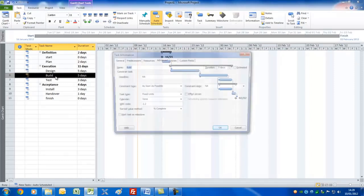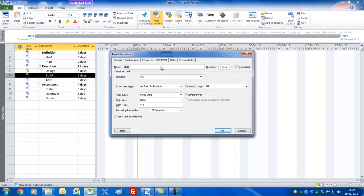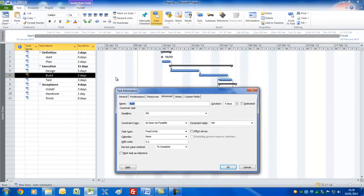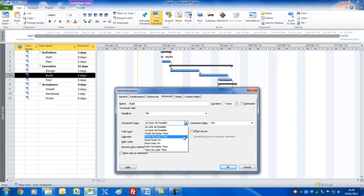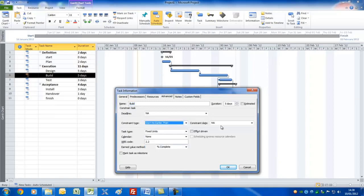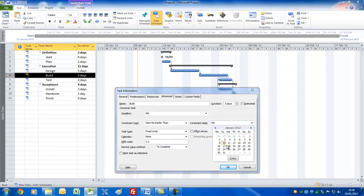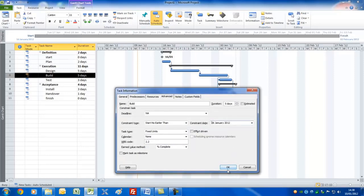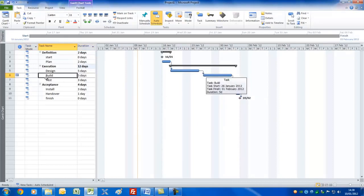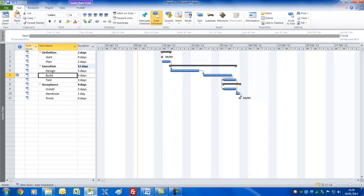Let's say for the Build task you need to wait until some materials are delivered — an external dependency. We'll double-click the task and set a 'Start No Earlier Than' constraint of the 26th of January, just to show that you won't have the materials to start building until then. Press OK. You can now see a one-day delay and a constraint symbol indicating this task has a Start No Earlier Than constraint.